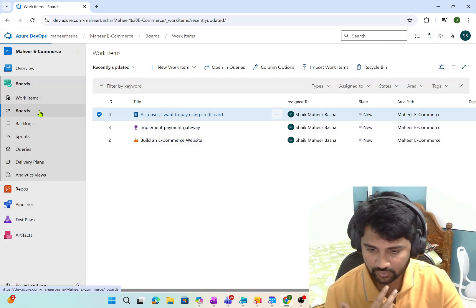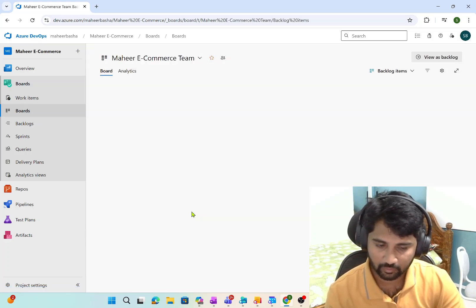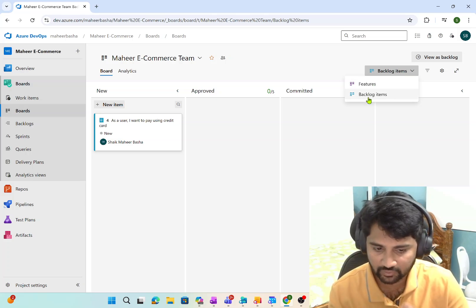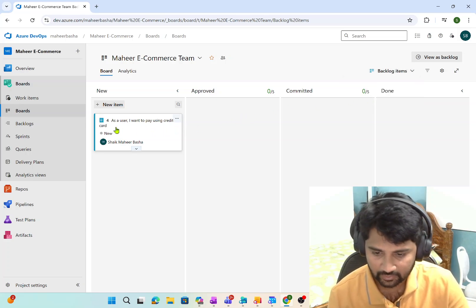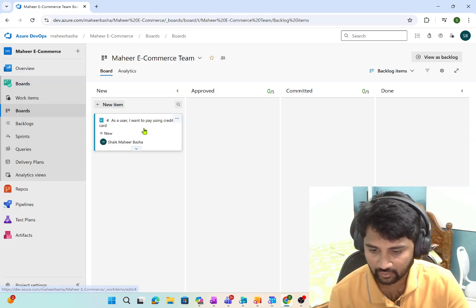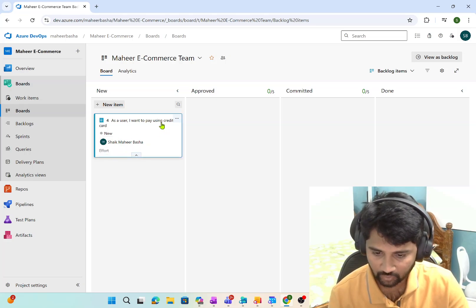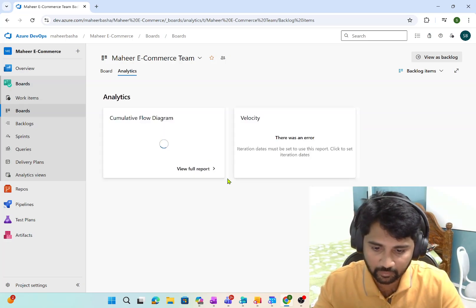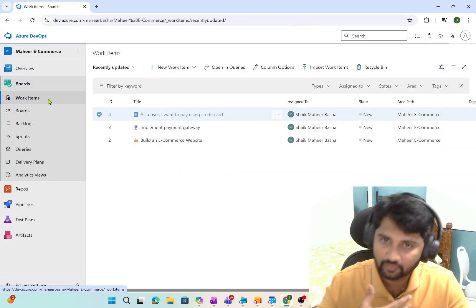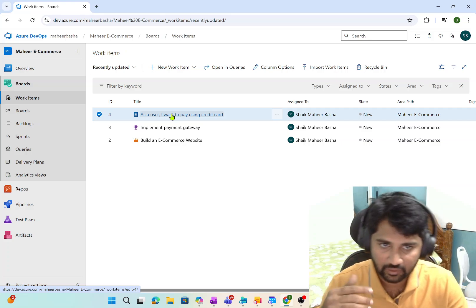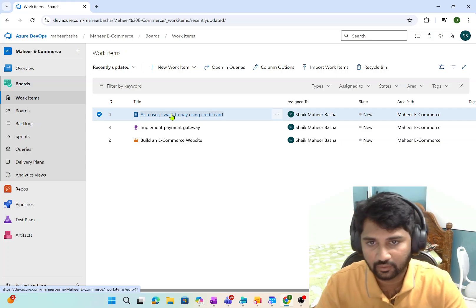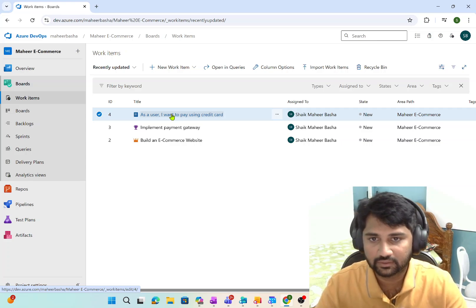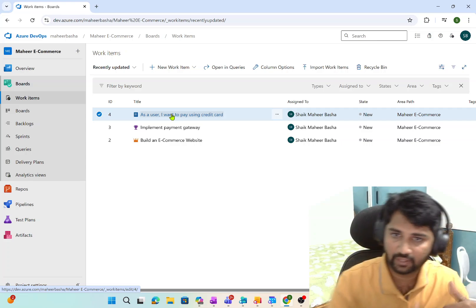If you go to Boards, you can see the same thing there. When I go to the Boards, let's assume I'm a developer who has to work on this project. They will mostly be using the Backlog Items view. You can see 'As a user, I want to pay using a credit card.' Now when I expand this Product Backlog Item, right now there is nothing — no task. What people can do is, once you have this Product Backlog Item, I as an engineer can create a task. One of the tasks may be to integrate the Stripe API for this credit card payment — that is one of the tasks.